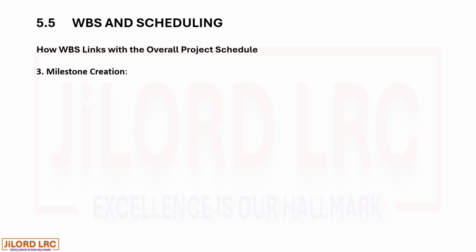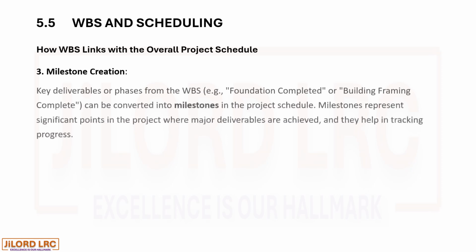3. Milestone creation. Key deliverables or phases from the WBS, for example, foundation completed or building framing complete, can be converted into milestones in the project schedule. Milestones represent significant points in the project where major deliverables are achieved, and they help in tracking progress.